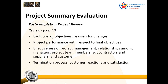There is sometimes an evolution of objectives, and in that case you document the reasons for change and the final project performance with respect to the final objectives. You also look at the effectiveness of project management — the relationships among managers, project team members, subcontractors, suppliers, and the customer. In class closeouts, ideas relating to what went well and what went badly often related to relationships within the group, showing that effectiveness of relationships is normally a recurring theme in post-completion reviews.